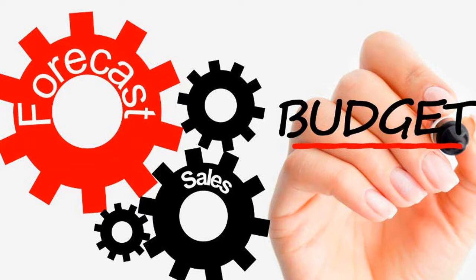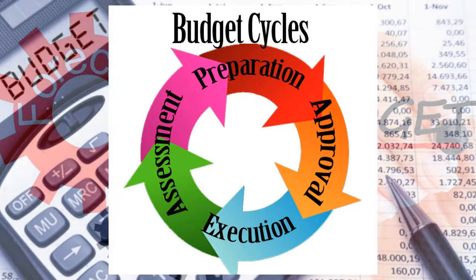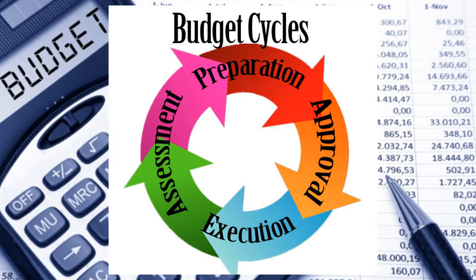In the given example, we can see that the highest money use was in week 3, when the most employees were hired. Also, in this case, we want to lower the work costs. We can optimize the tasks and replace the schedule. Optimization of tasks or even new planning of the project plan is required if the evaluated project costs exceed the level of available costs.